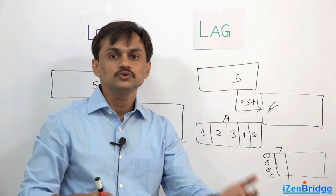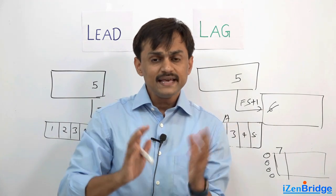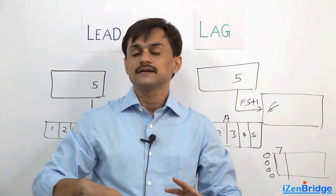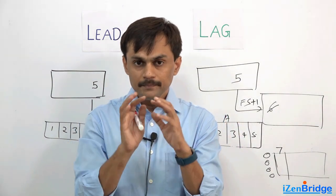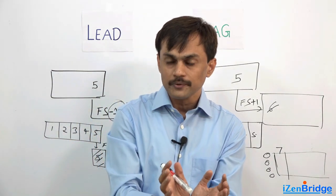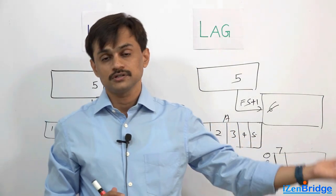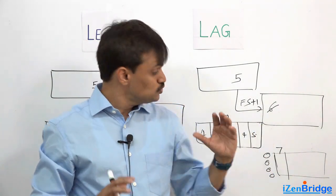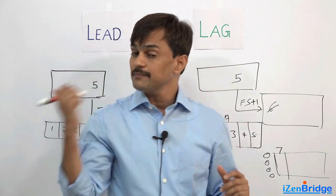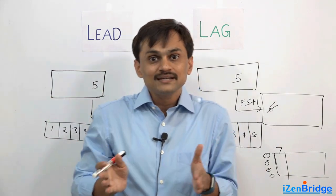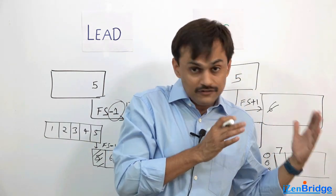Now sometimes it is needed. Say you may want to perform an activity - you have developed a product but it takes one day to dry, and only after drying you can paint it. So you will say let me produce the product and your painting can start one day after I produce the product. So you still had a relationship of finish to start, your painting is starting based on when I am finishing my product. But some days are added to it and that's a lag.